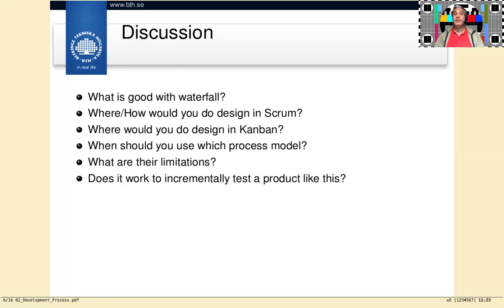Simply because you don't have, like in a classic development project, a month at the end of the project where you will freeze new development and only do testing. It's something that has to be done continuously. Then in Scrum and in Kanban, when it's time for a major release, you would probably put system testing into the backlog.